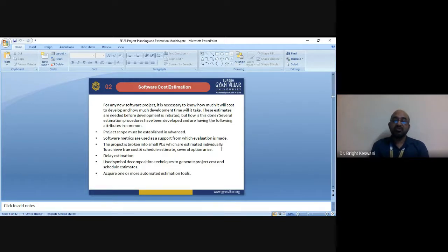So, when we talk about the first phase, the standard time spent on the first activity, that is product design: in the case of a small project, you can spend 19% of the overall project time, and in the case of intermediate, you can spend also 19% time on product design. Then in the case of medium and large, you can also spend 19% of the overall development time in the product design activity.